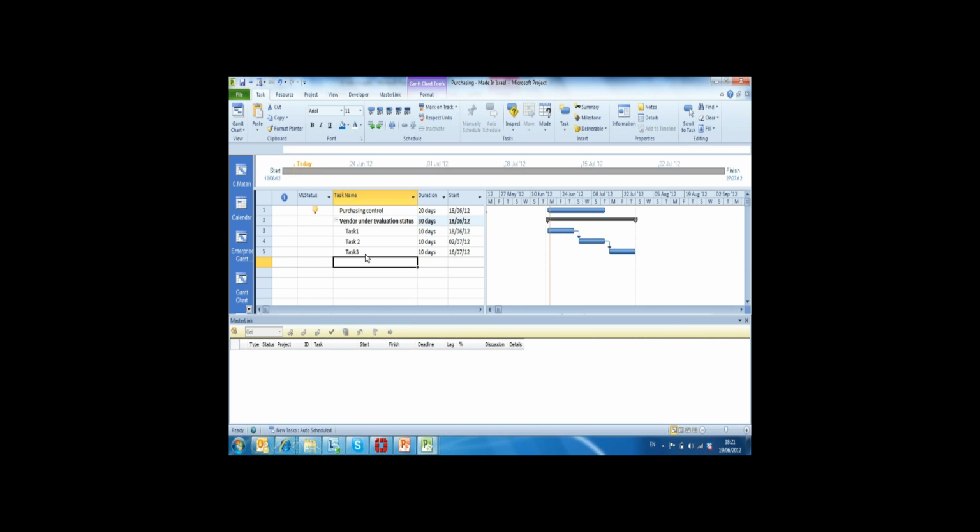Put task 1, 2, and 3 in here. And whatever changes I make here and I assign my resources to, whenever I choose, I can go ahead and publish this file, which in turn updates the project file with the current dates, the current work, the current percent complete of this summary task within their file. Okay? So we looked at things from the project manager view, and we sent something to the team manager.